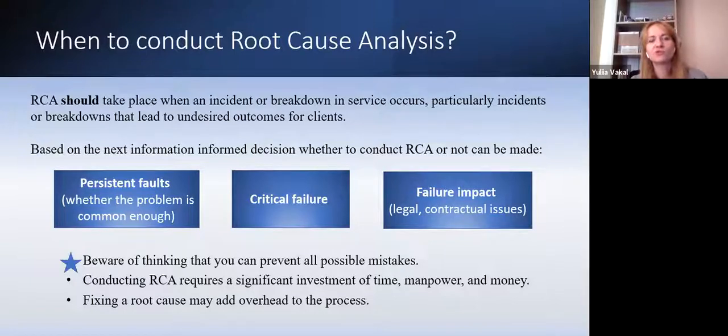You can even do your root cause analysis during your retro meeting, just add some time to your retro meeting, because you have the whole team involved, right? So you can do a lightweight root cause analysis in the retro meeting as well, but just extend it. But no more often than a sprint, definitely.